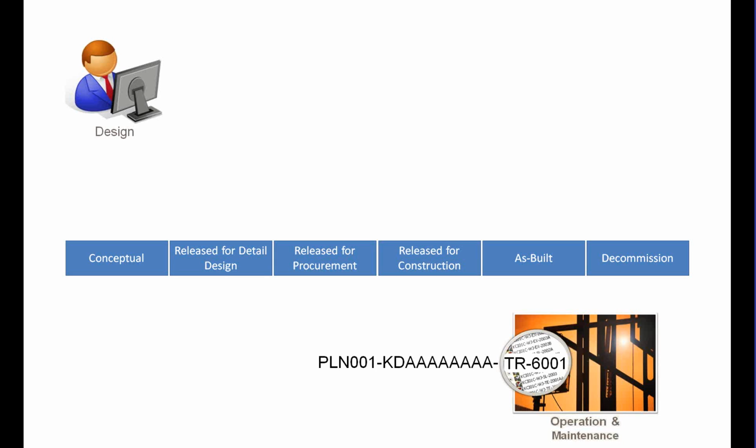I'm just going to follow on to that. The key for us here, and there are many ways you can solve these problems, just for us, across systems, what we've decided as our keystone is the functional location number. As long as we can maintain that functional location number across our disparate systems, that's where the connectivity is, then we can build processes around that. But the key is that functional tag, but also finding ways within the process to help build that classification of accounts hierarchy around that, the same way that you would build engineering information around the asset.